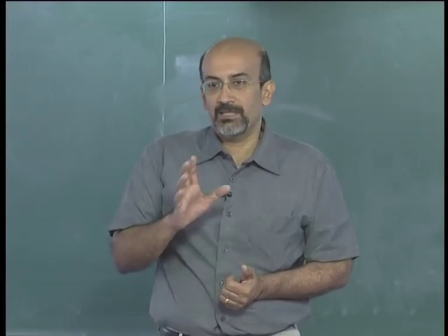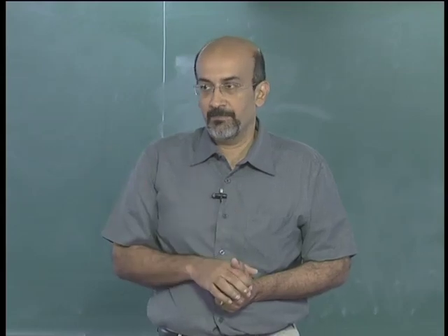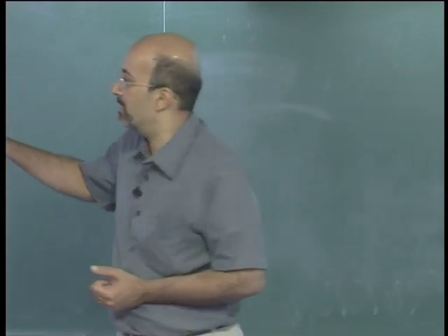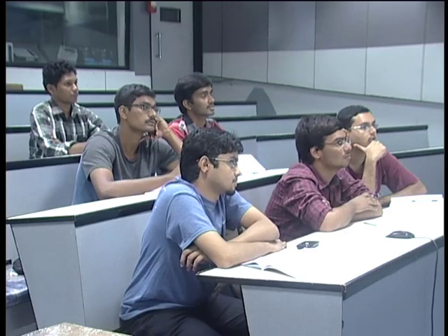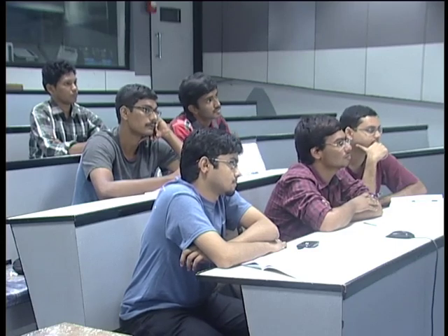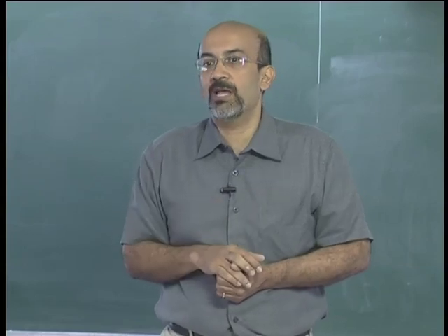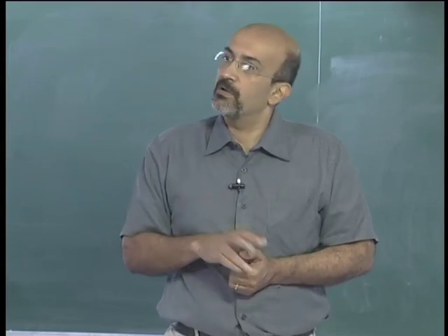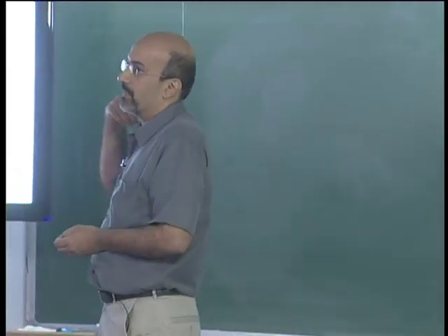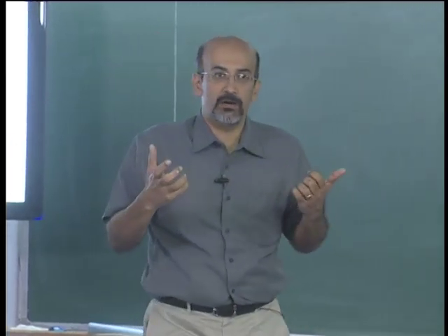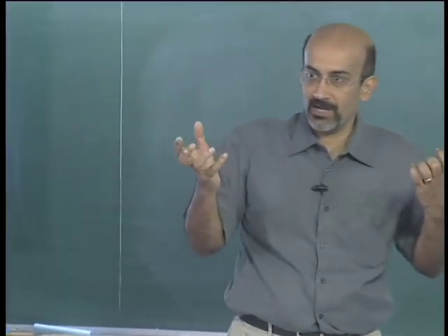Surveying, yes. So let's take it more for the construction. From the construction side, you've seen the bridge. Excavation. First comes pile. Yes. Okay. Let's start from pile driving. Okay. So I'm taking that as the scope of what this is. Before you drive the piles, what do you do? Soil is tested. You know you need piles. You have come up with the spec. You have actually mobilized on site. You are all ready now. You have been given the construction go ahead.